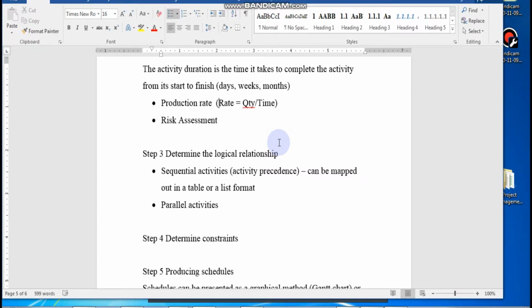And then also, before you draw, you think about potential constraints. Like for example, these are all external constraints if possible. Okay, when we talk about internal constraints, they are already appearing here in the duration calculation. So external constraints is where you think, some activities must finish within this month. There's an opening of another project next month, so I must finish certain activities here so that I can shift some of my resources to the other project. So those are external constraints that you can think of.